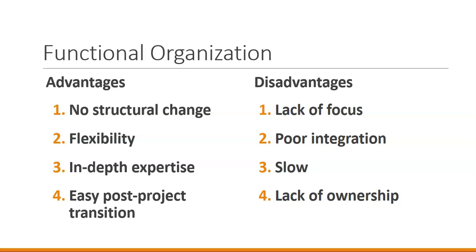The disadvantages, of course, are that it's slow. There's a lack of ownership. Instead of having a single manager who is involved in making sure that the project gets completed, it's every manager that touches that project who is in charge of getting it facilitated. So there's no real ownership of the project, and that can create tensions. It also means that we might not focus on it as much as one department wants us to.